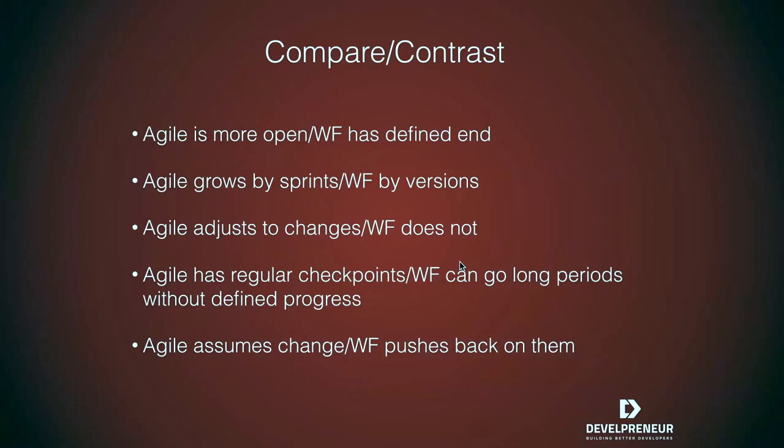In the waterfall approach, you're going to get pushback on changes, because a change is much more costly in a waterfall world. Everything has been planned, everything has been set up, and when you change, now we've got to find a way to adjust it. So you're probably more likely to have situations in a waterfall approach that say, okay, do you really, really, really need that change, or can you live without it?